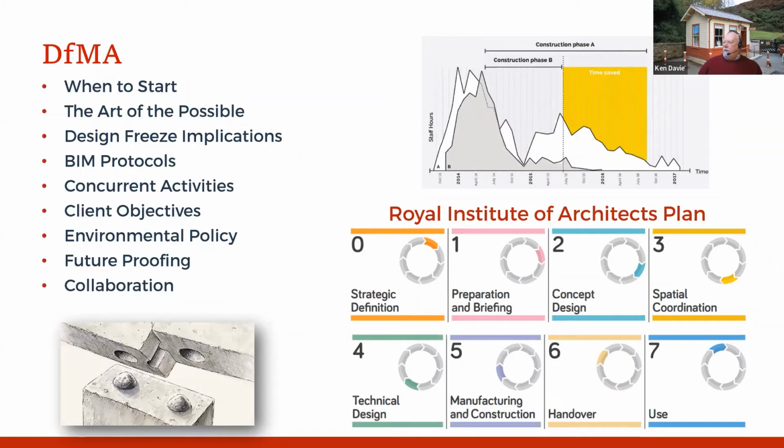And the same would apply from a construction perspective. I think the estimate is that you can do 3 OSM projects in the time it would actually take to do 2 traditional projects. So significant increase in productivity. So, as I say, DFMA is the enabler. If we're not designing for manufacturing assembly, then you really are limiting the opportunities to look at offsite manufacture.